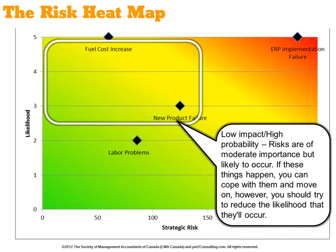In the top left corner, that's where the risks have a low impact but a high probability. These risks are of moderate importance, but they're likely to occur. If these things happen, you can cope with them with your usual management processes. However, you should try to reduce the likelihood that they occur, because dealing with them still consumes capacity.